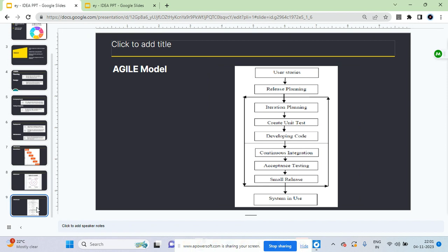Last is your agile model. It arranges the software development lifecycle into several development cycles. The team iterates through the phases rapidly, delivering only small and incremental software changes in each cycle. They continuously evaluate requirements, plans, and results so that they can respond to change quickly. The agile model is both iterative and incremental, making it more efficient than other process models.